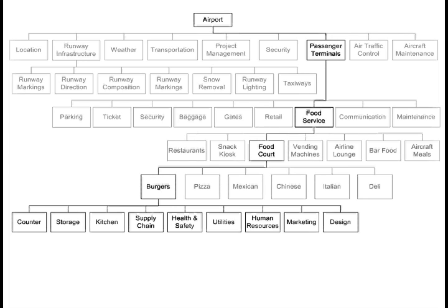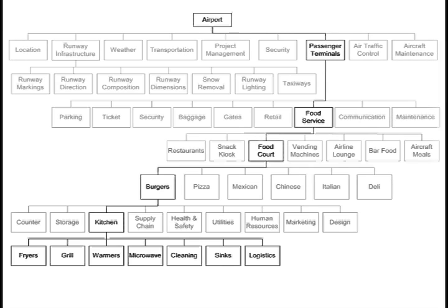Further subdividing the kitchen, we'd have fryers, the grill, warmers, microwave ovens, cleaning supplies, sinks, and the logistics of the mechanics of how things are arranged in the restaurant.